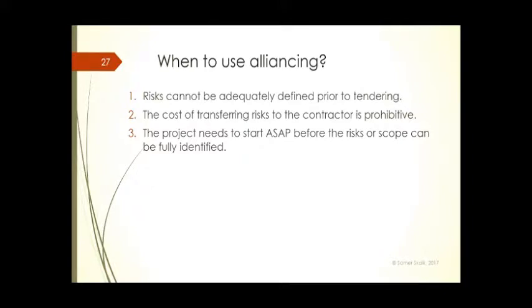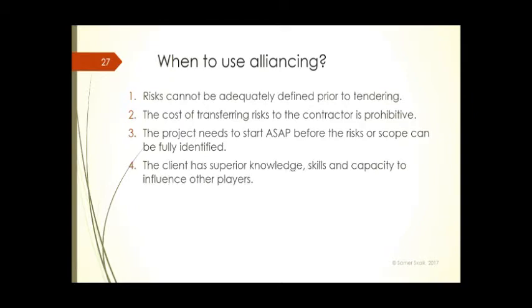Multiplex were also very active, so they did the work. Give me the next lot, the next package. No design, no information, no drawings, nothing. No construction drawings ever. And they were waiting. So what they did, they were just sending RFIs, requests for information. This is what could go wrong if you don't have sufficient design that will enable you to start with the construction. So many problems with that project, and I think it's a very good area for you to go and investigate further.